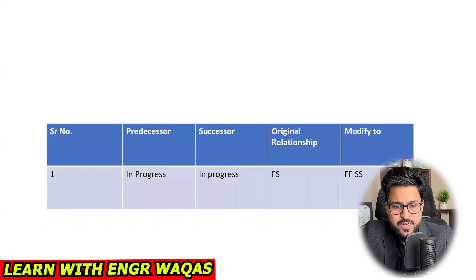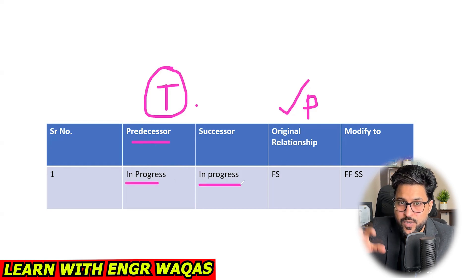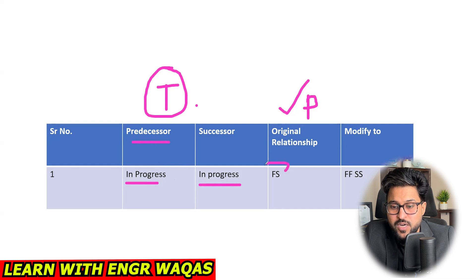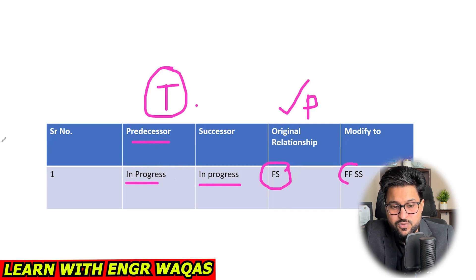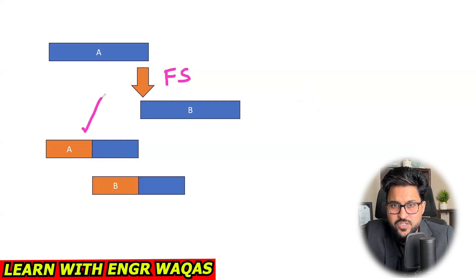Here is the first situation: both activities are linked with each other. In the planning phase the relationship is finish-to-start — it was supposed that the predecessor would finish before the successor starts. But in the tracking phase, both activities are in progress. This can cause out-of-sequence activities. To settle this, the finish-to-start relationship needs to be changed to either finish-to-finish or start-to-start.